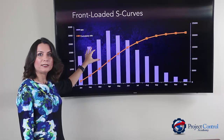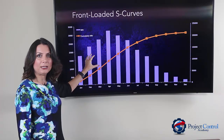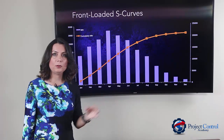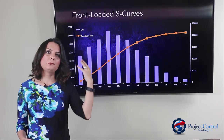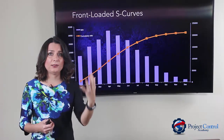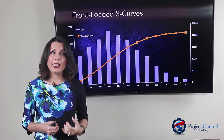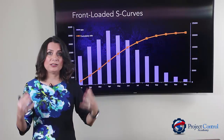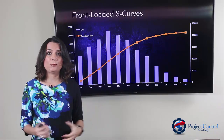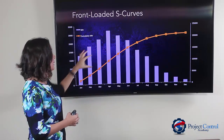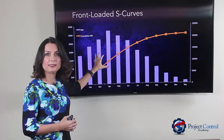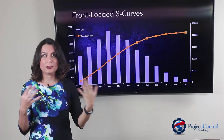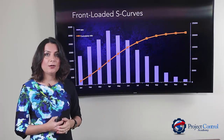Most of the load is at the beginning of the project. Examples would be projects that are accelerated early on — something happens and you're accelerating that project quickly, putting on a lot of resources at the beginning to finish based on contract requirements.